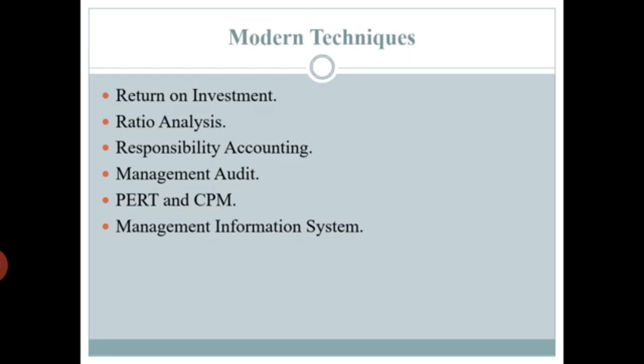An event is the beginning or the ending of an activity. It is represented by a circle in the network. An event by itself does not use time or resources. An activity is the time taken by an operation between two events. It represents time taken to complete an event. It is represented by an arrow. A simple network of events and activities appears like this. The project can be completed in the following two sequences of events. After developing the network, managers focus on time estimates to complete each activity.